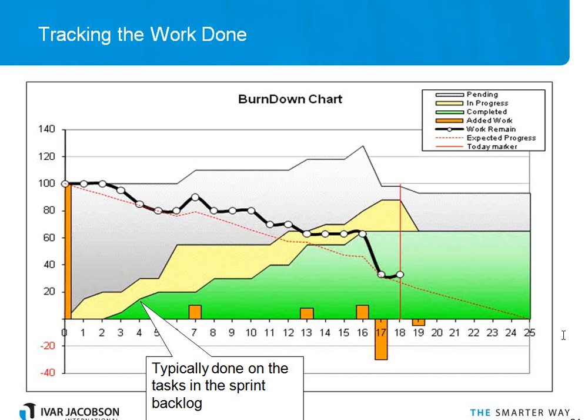The thing about burn down charts, and the reason I'm sometimes not much of a fan of them, is you need to have that context, as we saw before. Otherwise, you can't tell if there's really been any progress. Okay, so we see a big drop between day 16 and 17, purely because we de-scoped. We didn't actually finish anything between 16 and 17. See, the green's a straight line. We did start a load of stuff. We didn't finish anything. And again, we didn't finish anything on day 18 either. Is that okay? Hopefully that answers the question.